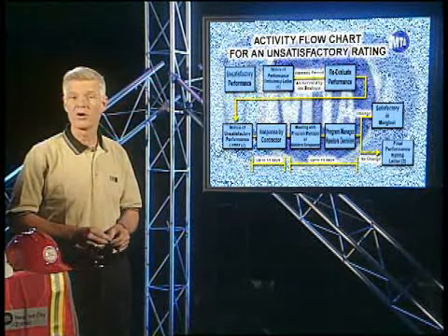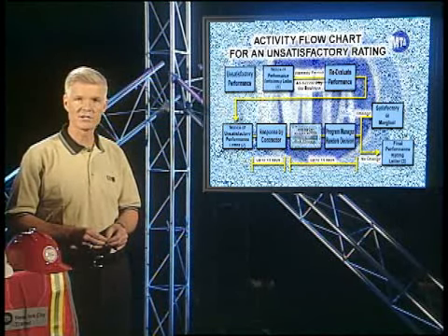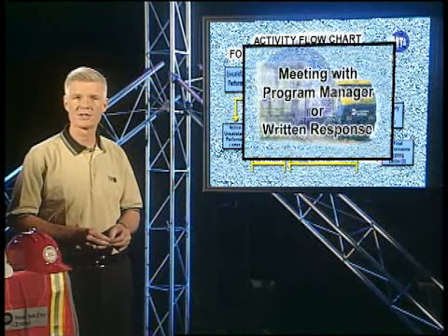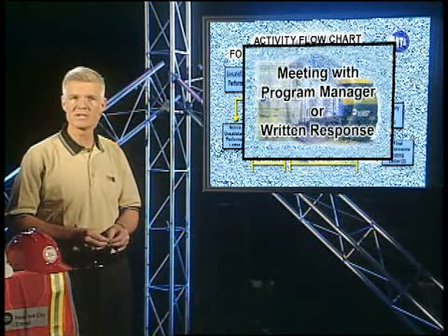Their response to the overall unsatisfactory evaluation will then be heard by the program manager, and he will then render his decision. The program manager is the designee of the Senior Vice President and Chief Engineer of Capital Program Management. The program manager is given 14 days to review the response and render a final decision.